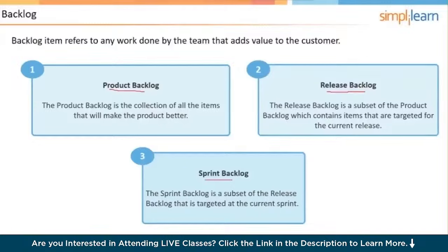For example, I've got a real-life project that I'm working on, and my product roadmap has 3 versions. It's a website. The first version is free. The second version includes a membership component, and the third version includes a referral commission portion to it. And so I will then do 3 releases. I'll have all the user stories that will result in version 1, all the user stories that result in version 2. So that's what the release backlog is.